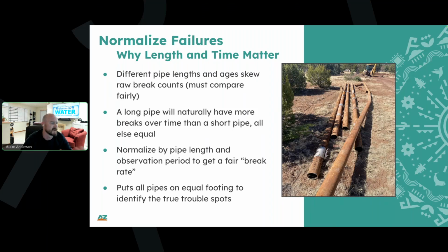And in total, some of them got ripped off during excavation, but we counted 22 repairs. And so let's say roughly on this 200-foot section of main that's quickly turning into more Band-Aid than it is pipe, each of those repairs costs $250 in labor, maybe $150 for a Band-Aid clamp, and $150 in heavy equipment. Well, if you have 22 of them, that's $12,000 that you've spent on this 200-foot section of main, and really wasted the resources, because it's not like you can go and reuse all of those clamps. Once you've made the repair, a lot of those costs are sunk.